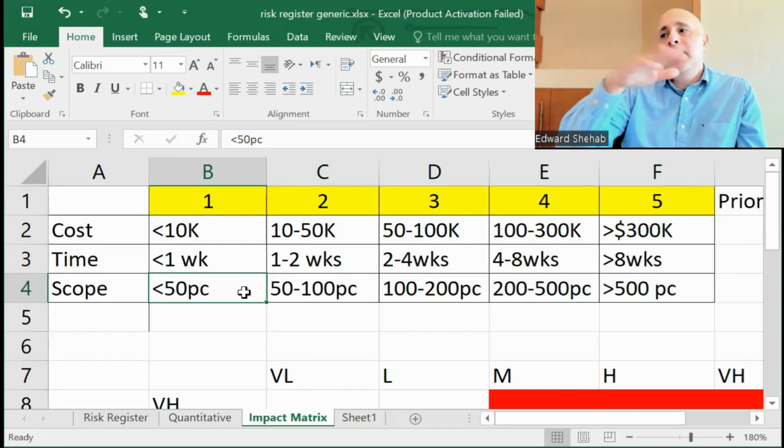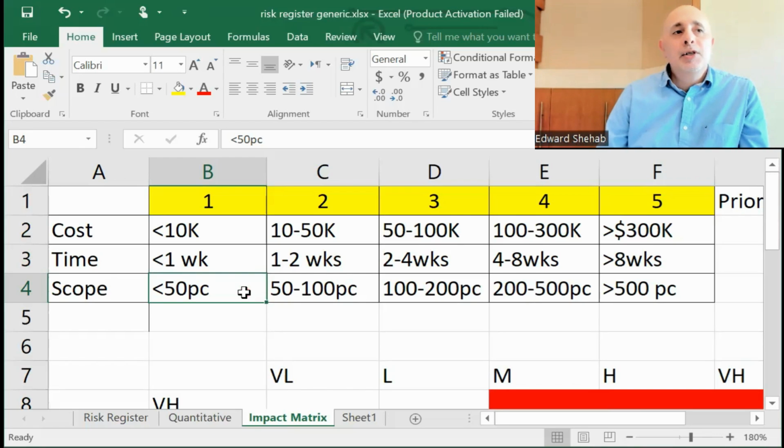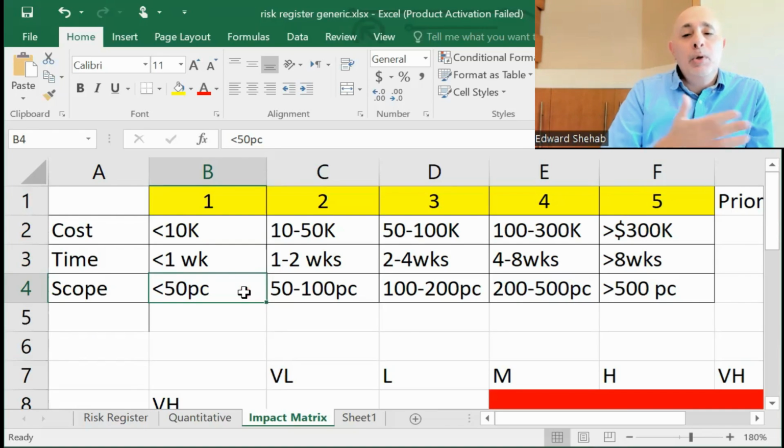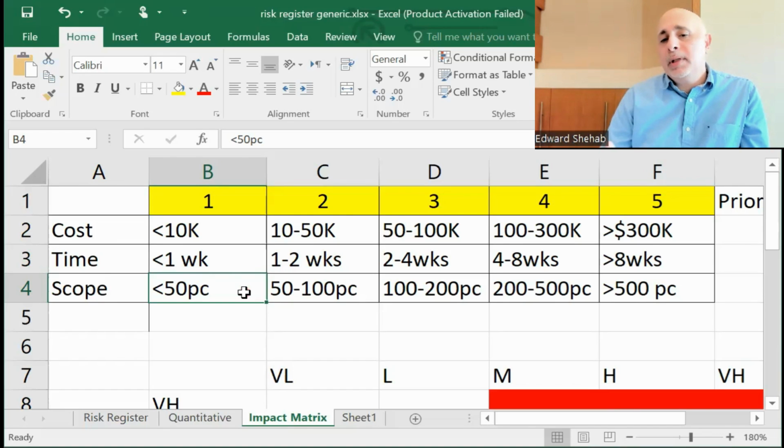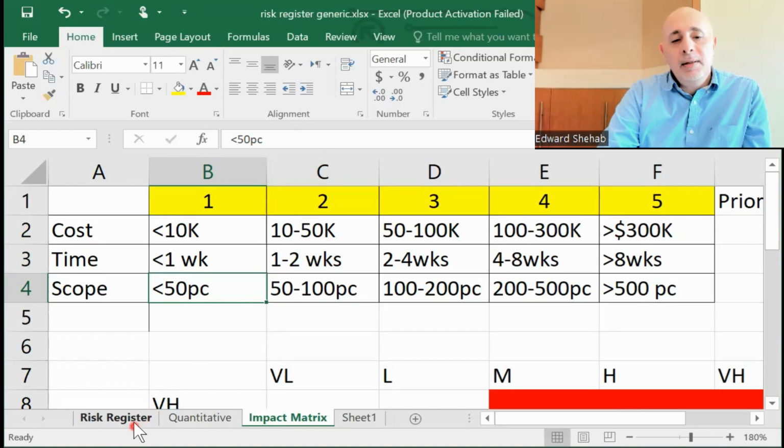If you have like 10 people sitting in that team meeting or 5, just ask them to give you a rating of 1 to 5 and take the one that is mostly repeated. So 2 people say 3, somebody says 4, someone says 5, another one says 2. I probably will go to 4. I'll feel like that's a comfortable number to go with. You can go with an average, but it doesn't need to be mathematical. You just need to get a general sense of what people think the risk will be.